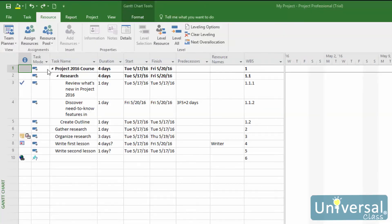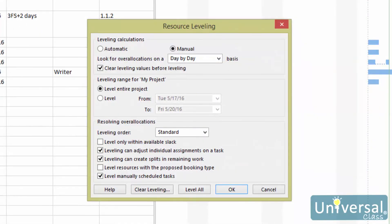To level resources, go to the resource tab and click on the Leveling Options button. You'll see the Level Resources dialog box. Choose Automatic or Manual. Automatic lets Project level your resources every time you change the plan, and Manual means that you'll have to return to this dialog box every time and click the Level Now button. If you select Automatic, enable the Clear Leveling Values Before Leveling checkbox — this makes it so previous leveling actions will be reversed before you level the next time. Now set the leveling range: you can either level the entire project or level a date range.